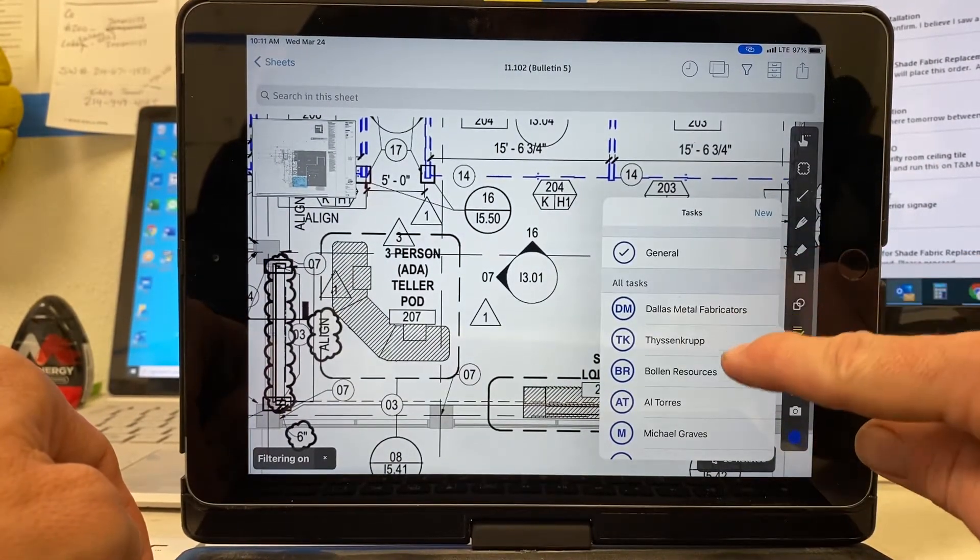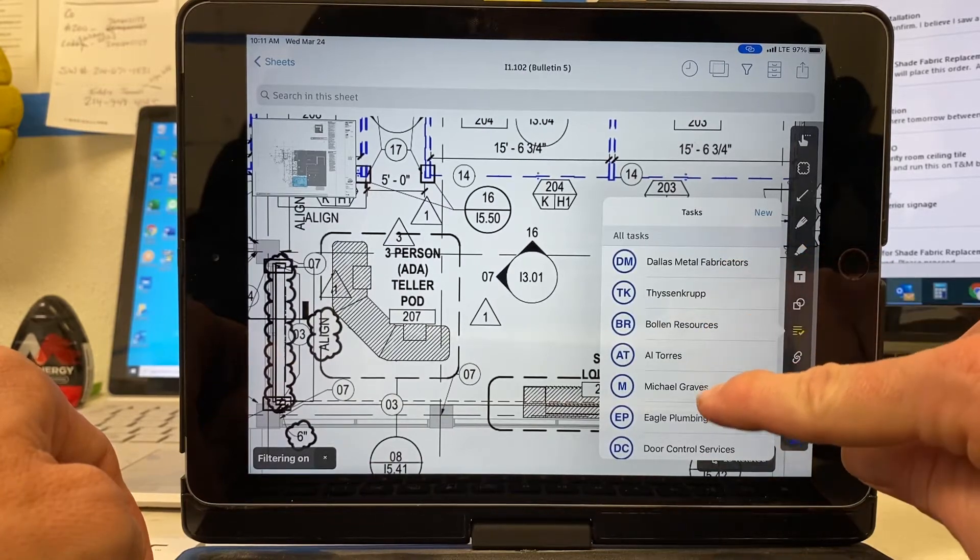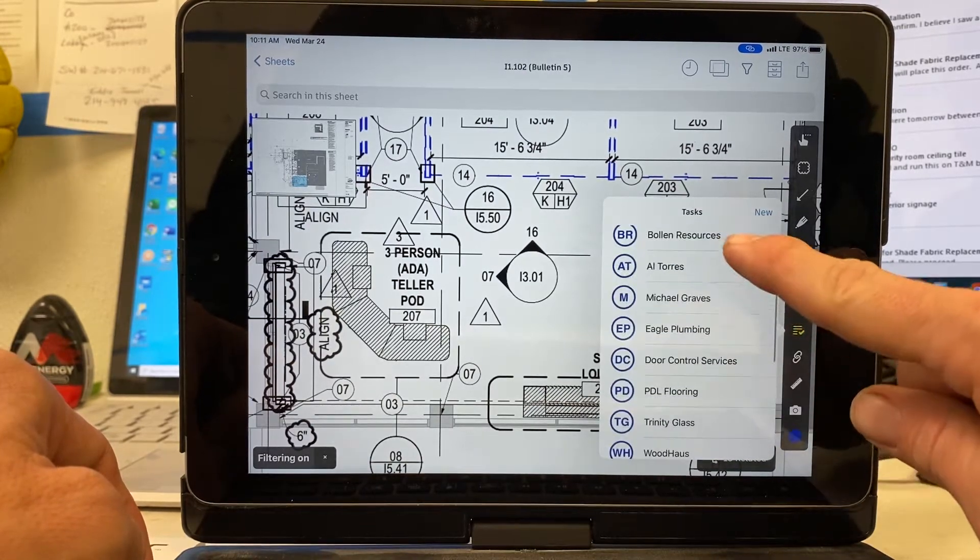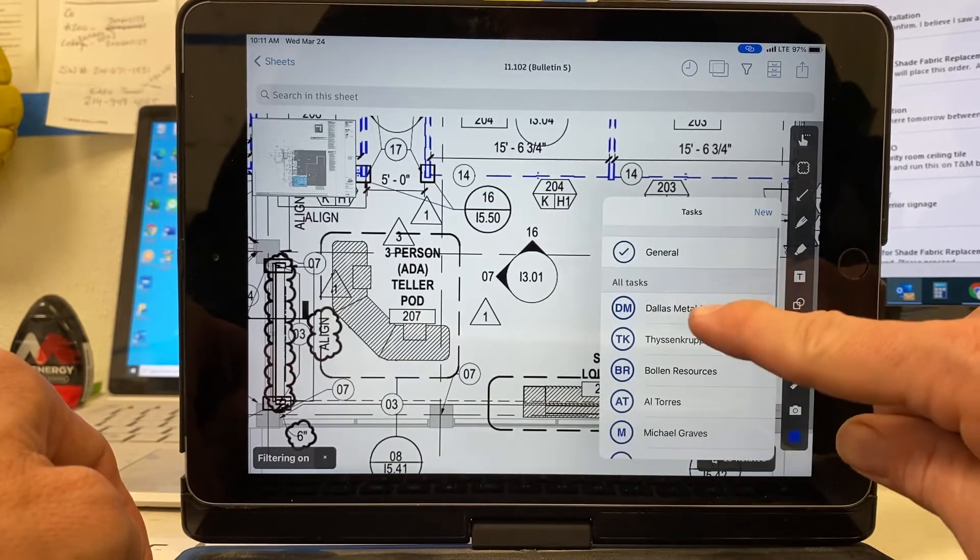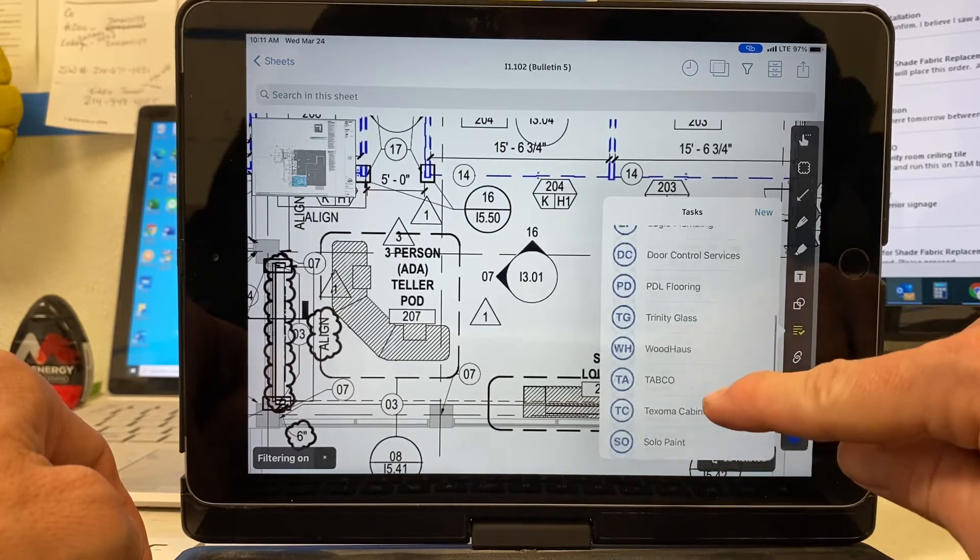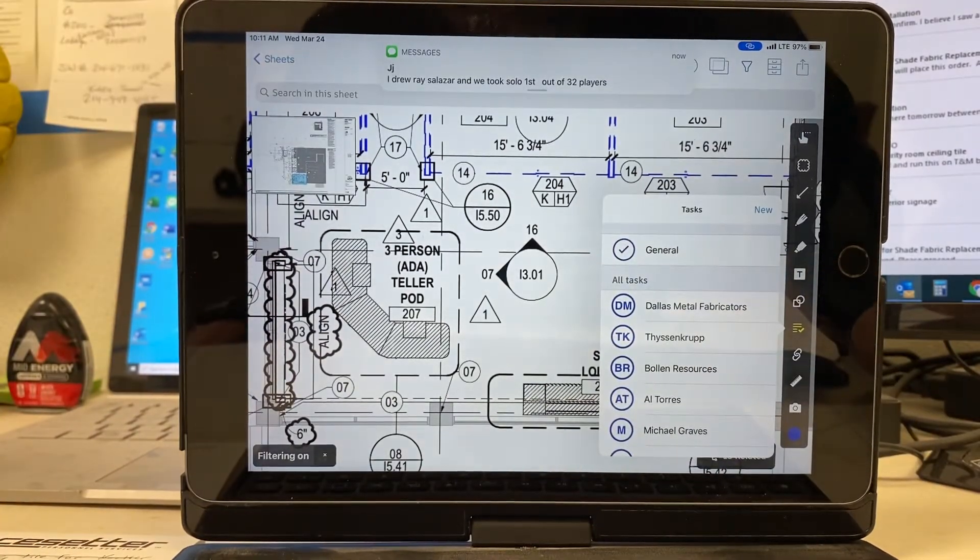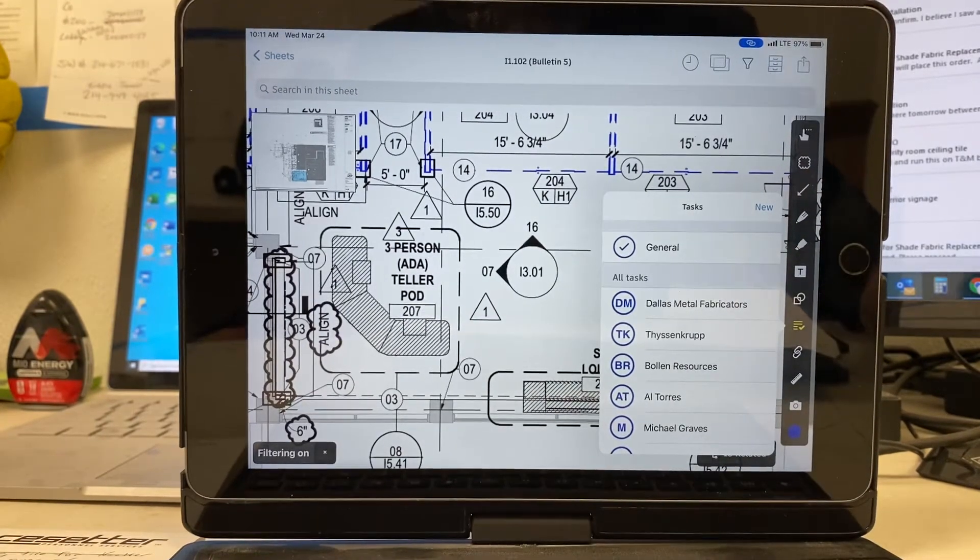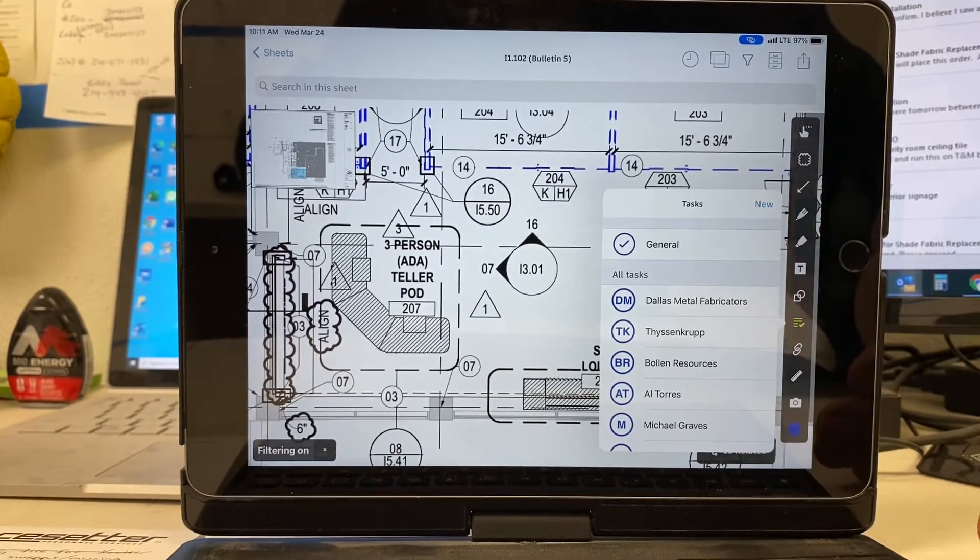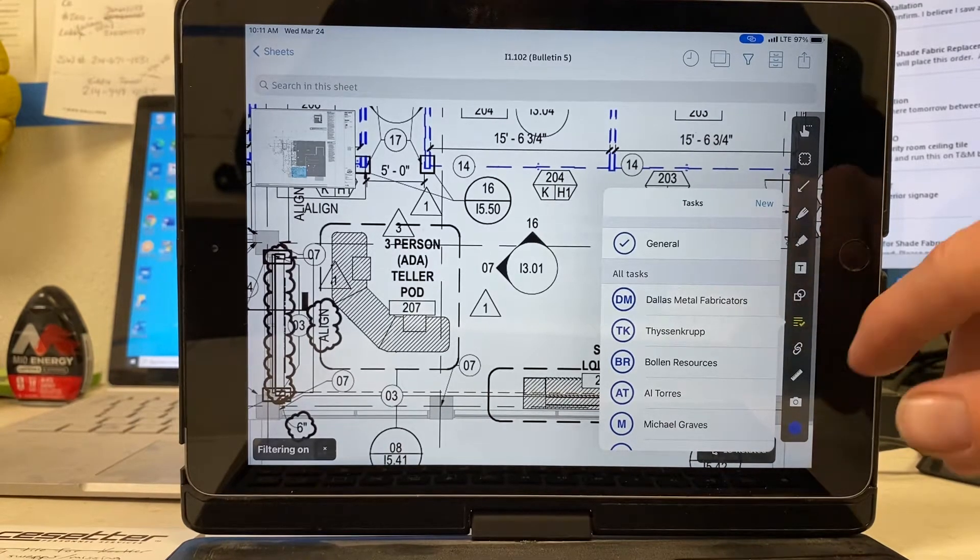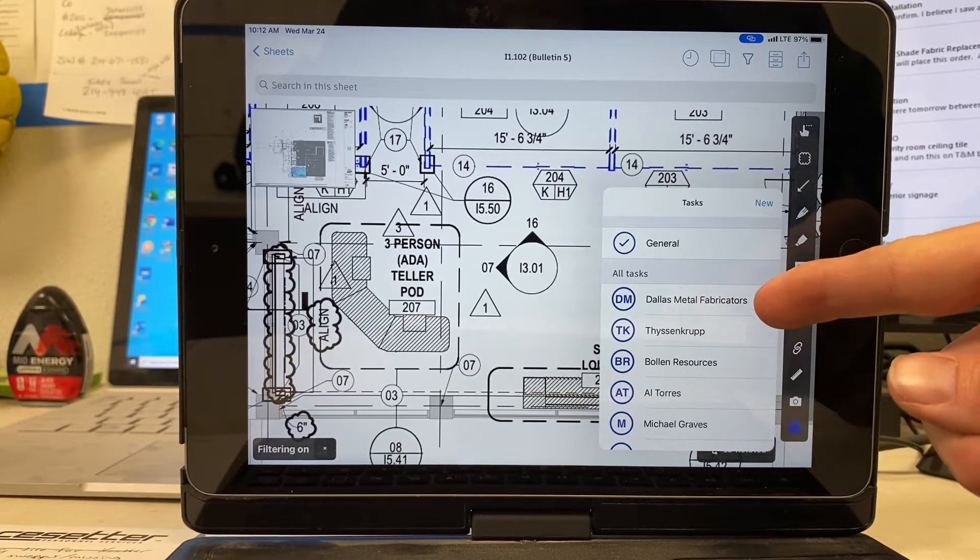Now I've gone through here already and I've put all of my sub names in on all of these different task items. Wherever it says drywall, paint, caulking, that kind of stuff, we don't want to use those because it's really hard to decipher at the end whenever you make the list. So we're going to make it to where it is the subcontractor's name.